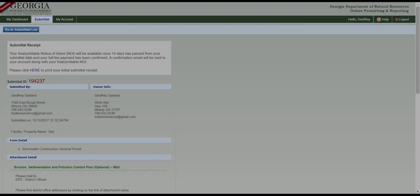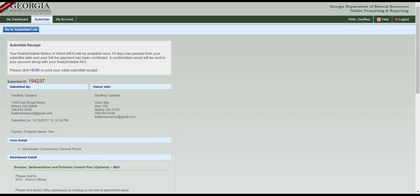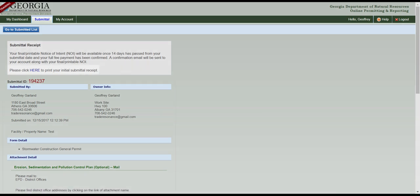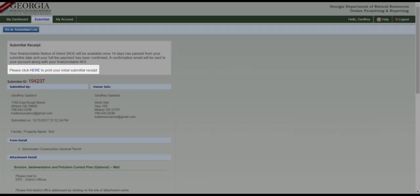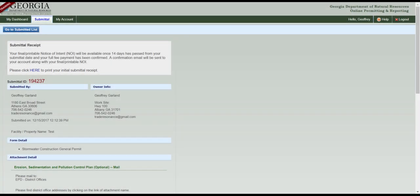Once you submit your application, you'll be taken to the Receipt page. Click here to print the initial submittal receipt. If you're paying by check, make sure to include a copy of the submittal receipt with the check to send to the Land Disturbance Fees lockbox. Lastly, record the submittal ID for your records.